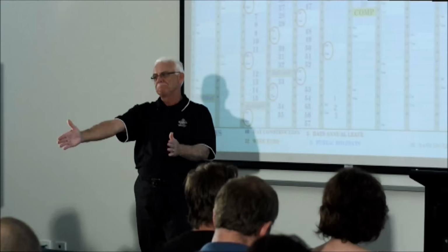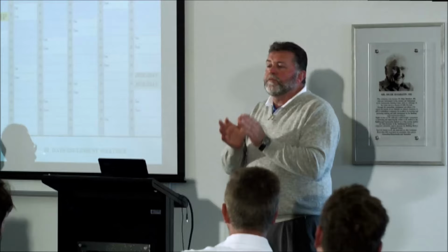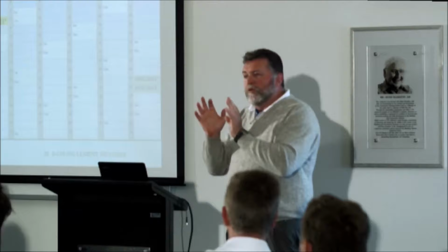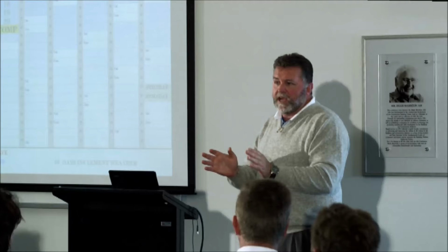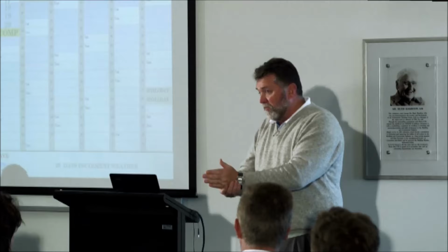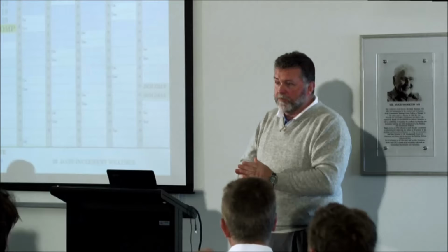Okay. Just, there is another part to that answer too. The alternative the owner actually has is to be able to terminate your contract because you're in breach of the contract. And it's not so much the contract. What you've got to understand is what is in all the contracts that Paul's explaining here today is in the Domestic Contracts Act. It is not something that someone's written up outside of legislation. The legislation says that you must give the owner a contract information statement at the time of signing the contract. At the time of signing the contract, you also get the deposit, as Paul said, the 5%. So that's at the time of signing the contract.